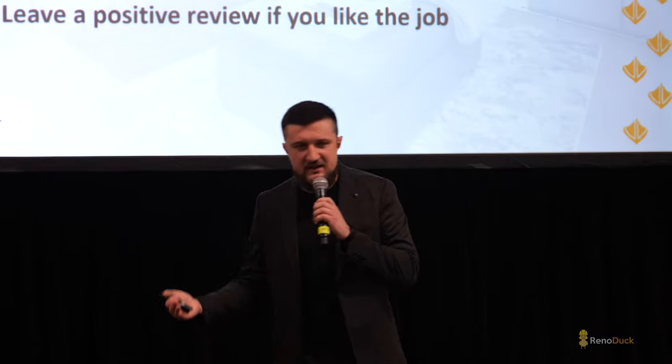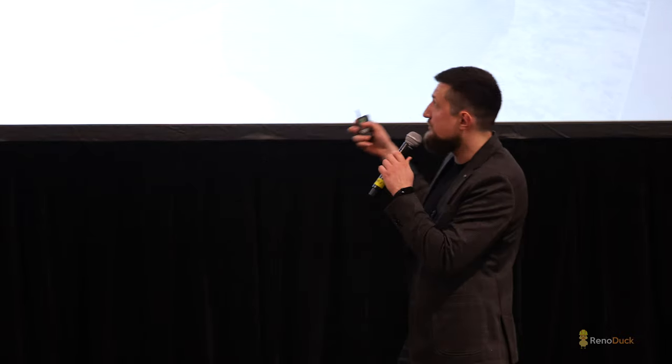Number five, make sure you communicate any changes in writing. Trust me, you're going to call a contractor, he has 25,000 things going on. You tell him something, maybe he didn't understand you, you didn't understand him or her. He then gets a phone call from another job site, there's an emergency, there's an issue, he probably forgot everything that the conversation was about. So if it's not in writing, it didn't happen. Put everything in writing, that's a pro tip.